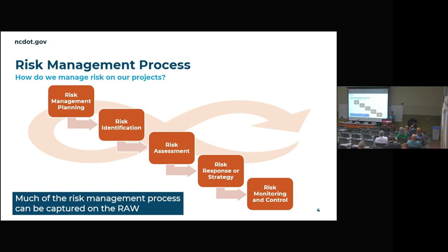That's the next step. Looking at those risks, looking at which ones are the most likely or most impactful to your project. And you want to make sure that you're either reducing the impact or reducing the probability, and you do that through a strategy plan for that. And you also assign an owner for that risk, someone that's going to track it, someone that's going to take into account everything that your project team has basically come up with for that strategy.